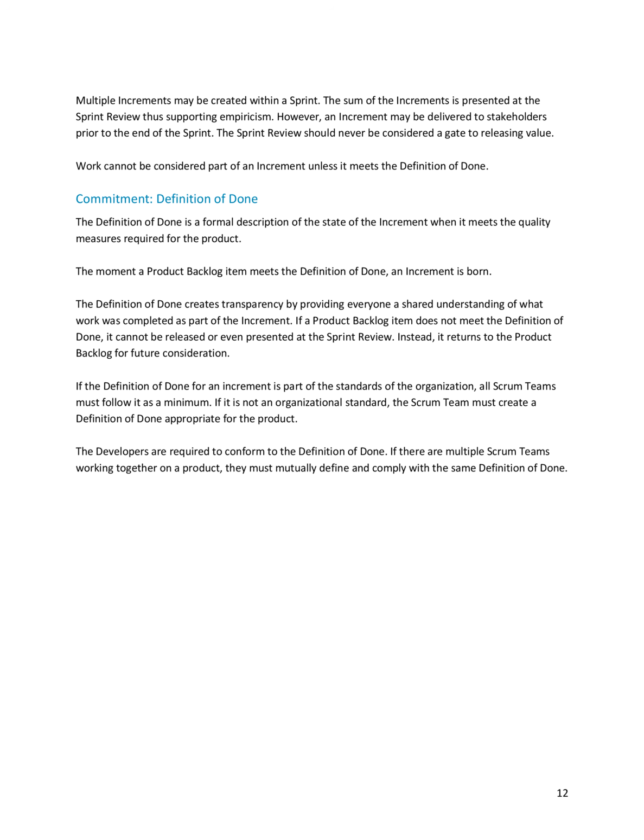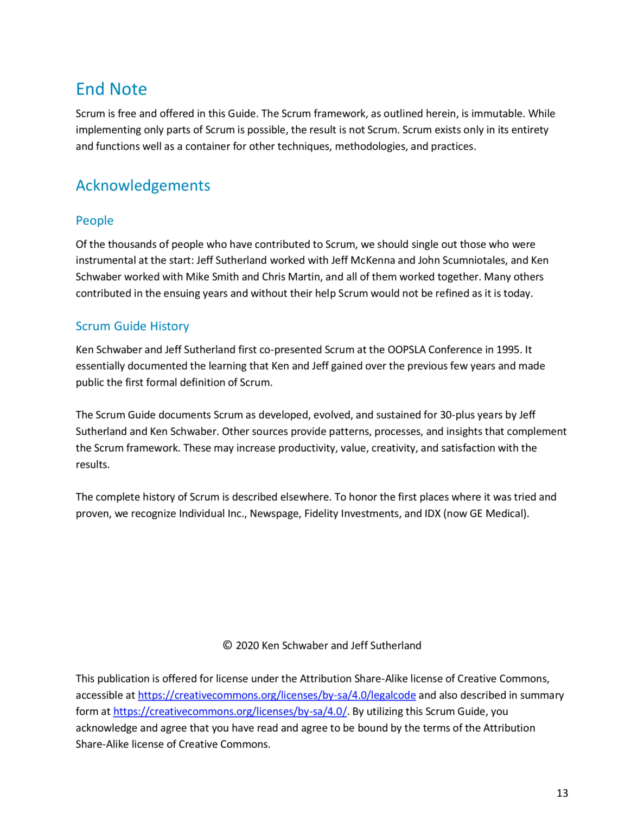If it is not an organizational standard, the Scrum team must create a definition of done appropriate for the product. The developers are required to conform to the definition of done. If there are multiple Scrum teams working together on a product, they must mutually define and comply with the same definition of done.